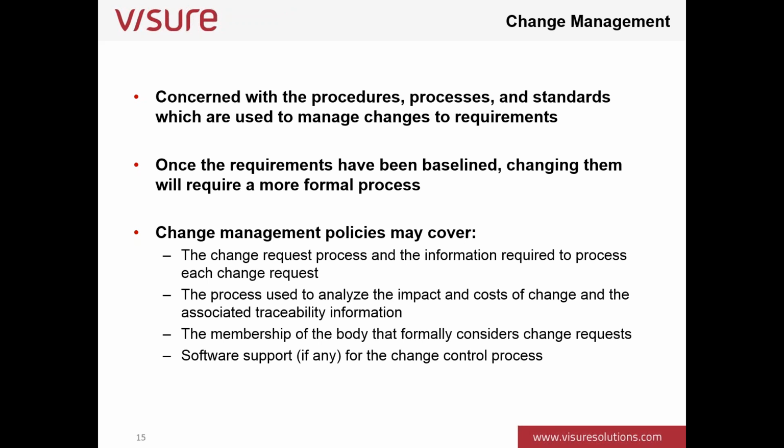There will be a workflow probably with different status in order to support that change. And once the change has been approved, we can just apply the changes to the requirements, modify the existing requirement, create new requirements, delete existing requirements, and so on and so on. Okay, so it's going to be much more formal than just go to the requirements, modify these, and save.